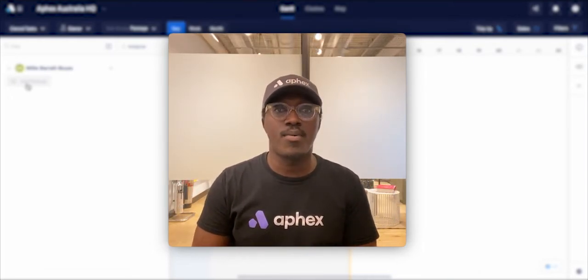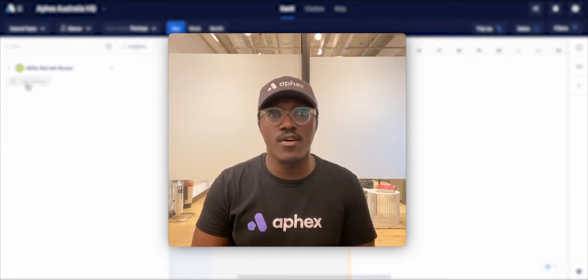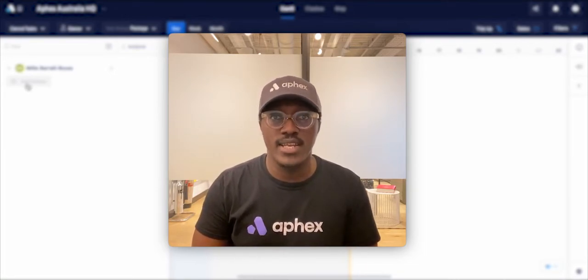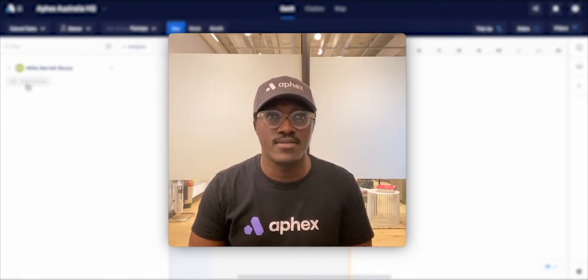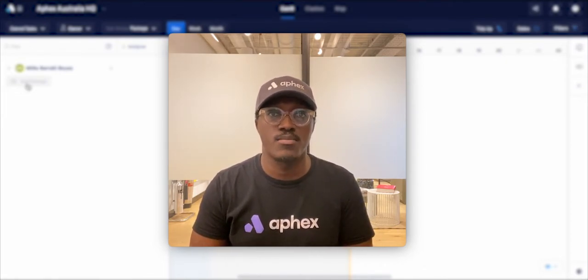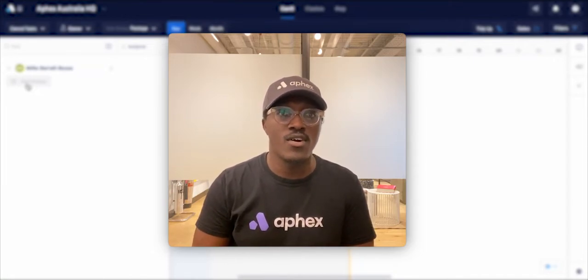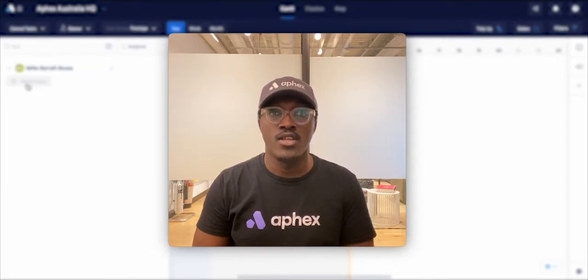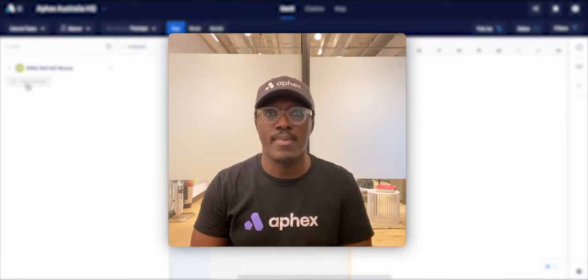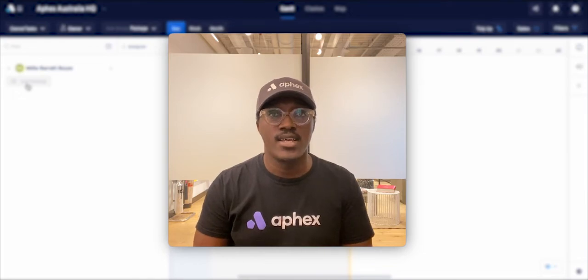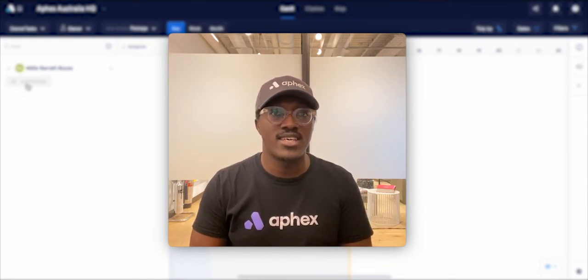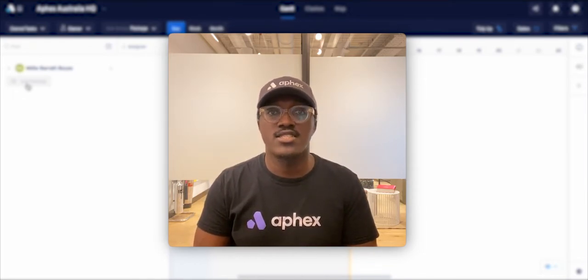Packages can be created by anyone on the project and by default will be set as private, meaning that only the user that created the package can see and add tasks to it, indicated by a padlock symbol to the right of the package name on the Gantt table. The rest of the project can be given access to the package afterwards if the owner makes it public, and this changes the symbol next to the package name to that of a globe. There is a little bit more to packages that isn't pertinent to this lesson, so let's carry on.